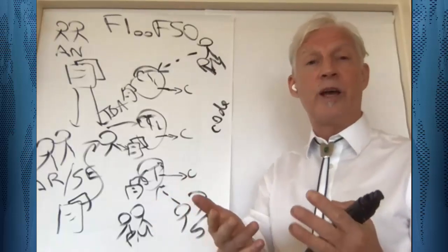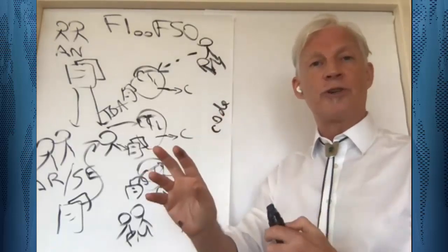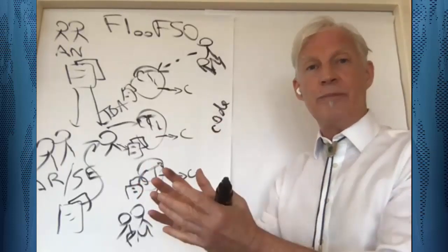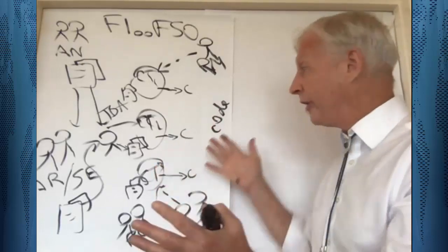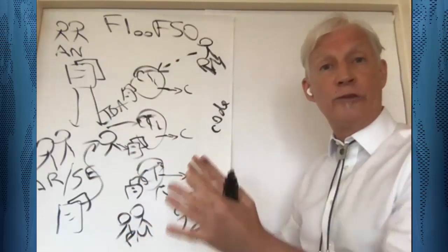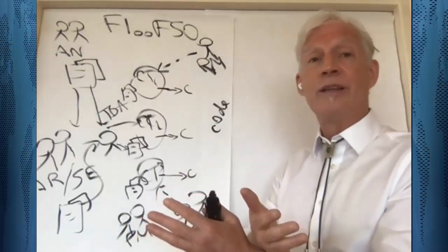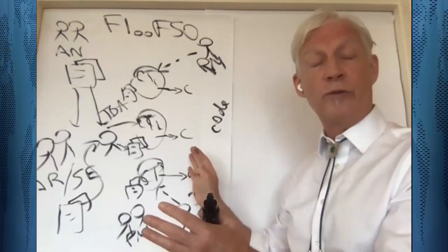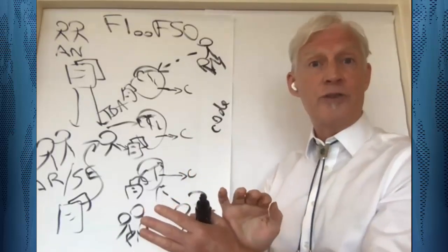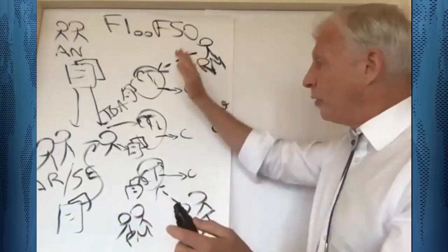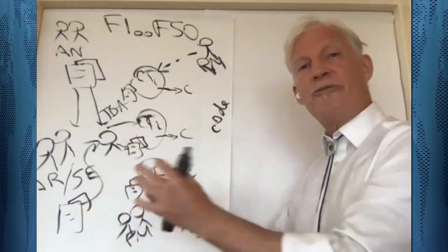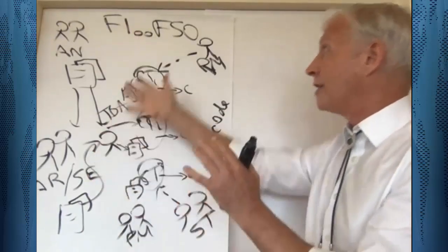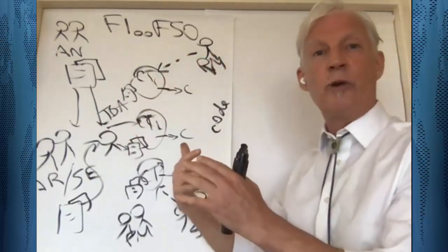As one of multiple examples, we move to an alternative team structure called feature teams. And in a feature team, you have one team that does everything. So this existing organizational design is dissolved, which implies, by the way, that the line manager positions of these existing groups dissolve as well. And we'll come back to that point and the implications of it in a moment. This group is dissolved and we reform into feature teams where we take people with skills in analysis and architecture and programming and testing and so on and so forth.